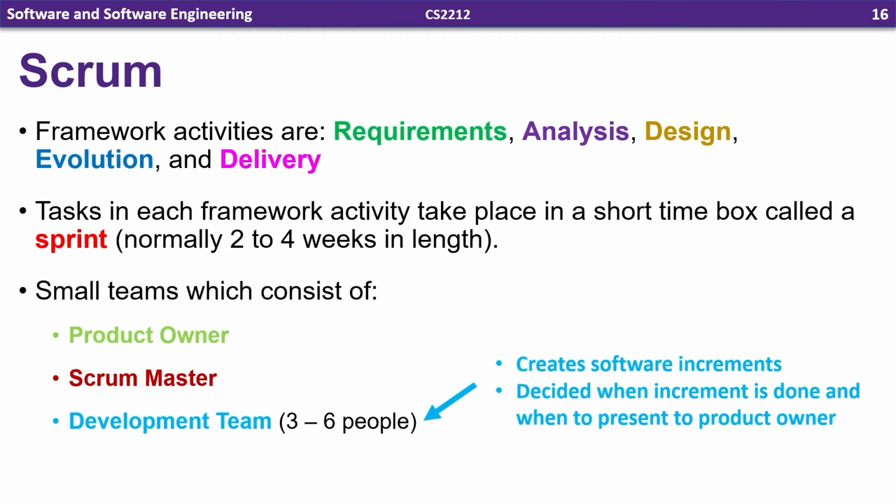So one thing you might be wondering is, if this is only for about 3 to 6 developers, how could it ever be used for something big, like modern video games, for example, which probably have teams in the hundreds? Well, the key thing is breaking your problem, or something like a video game, into many small compartmentalized components. And that way you can have specific teams for each one. You might have a team, for example, in the case of a video game, dedicated to graphics, one dedicated to the game engine, one dedicated to designing the dialogue and characters. You might have some teams solely dedicated to just developing tools that the other developers will use to create that game.